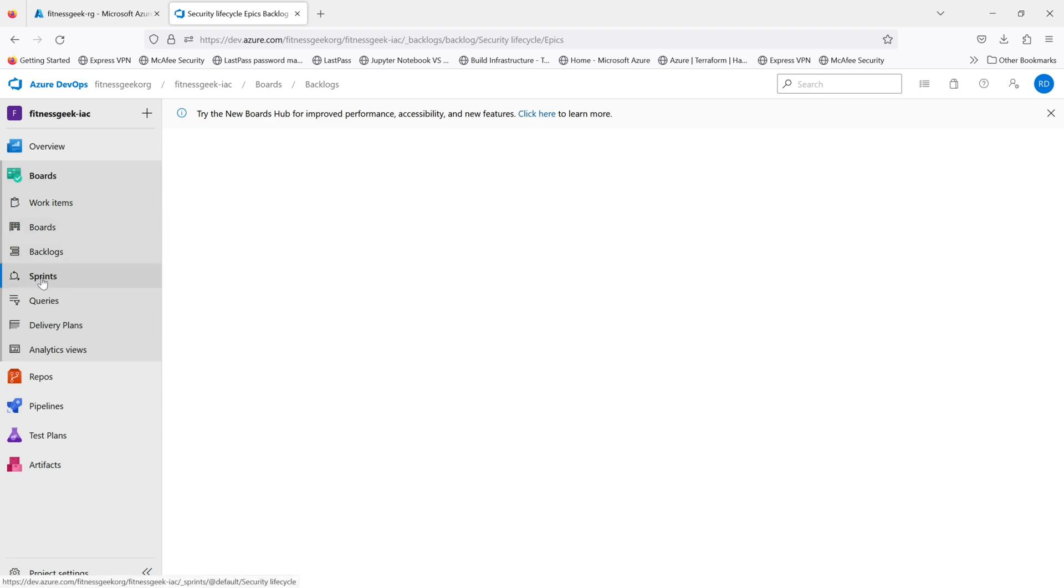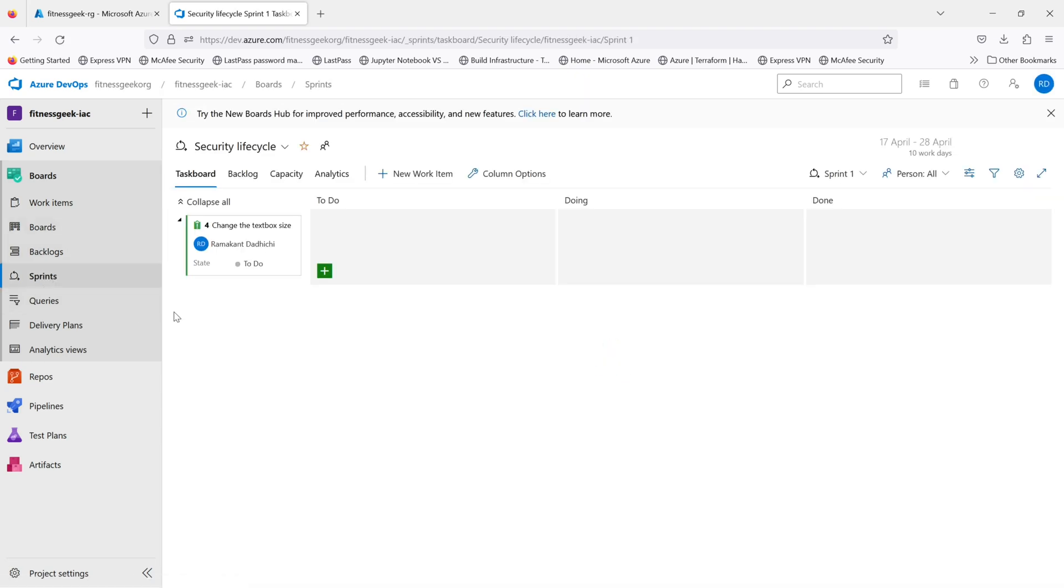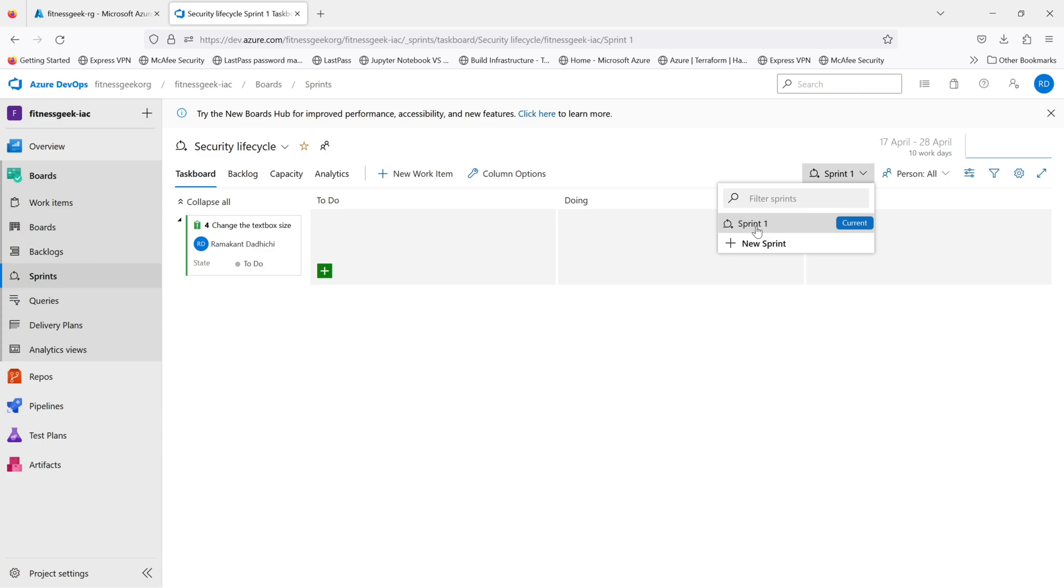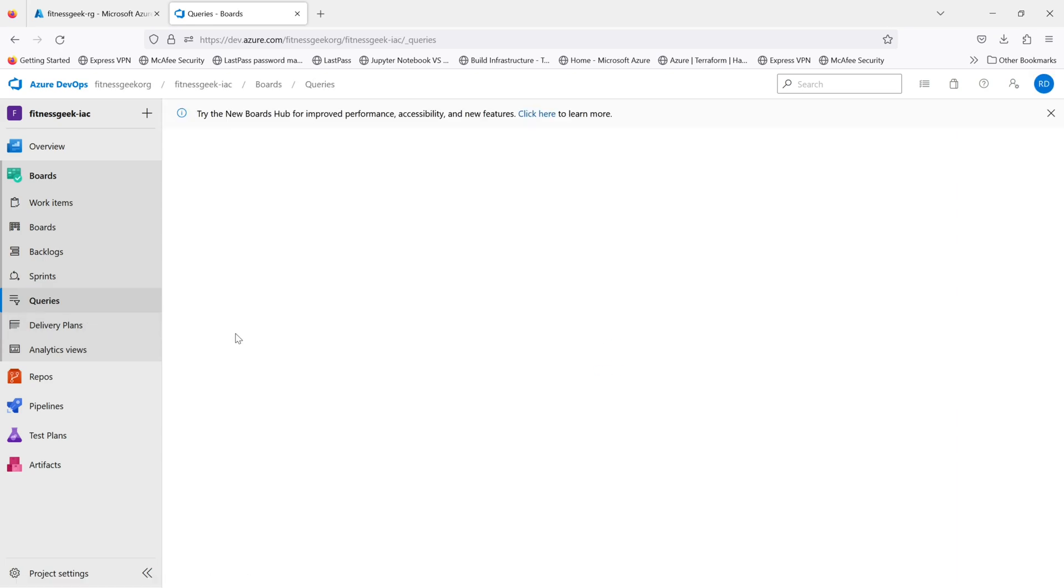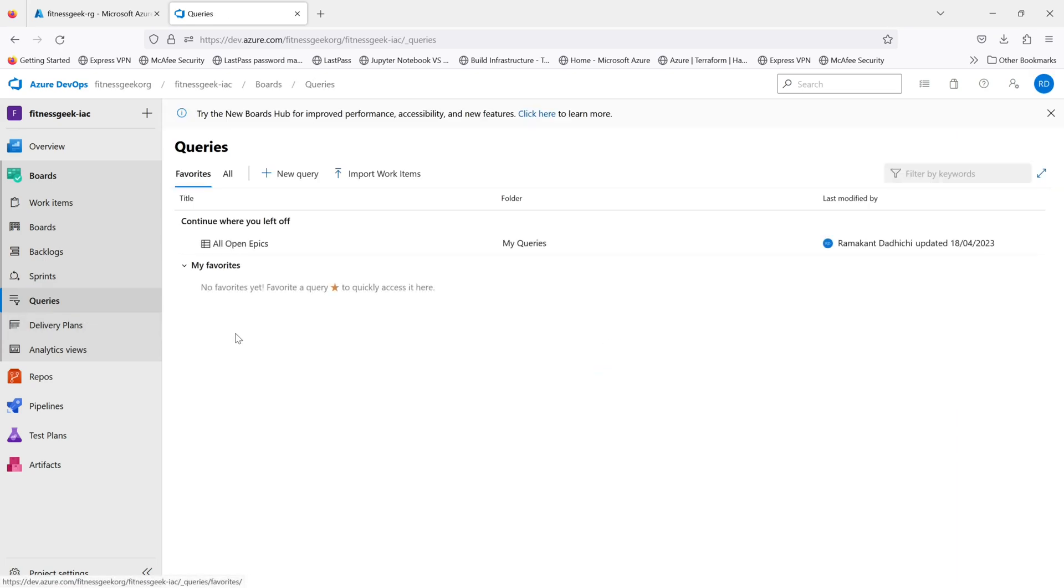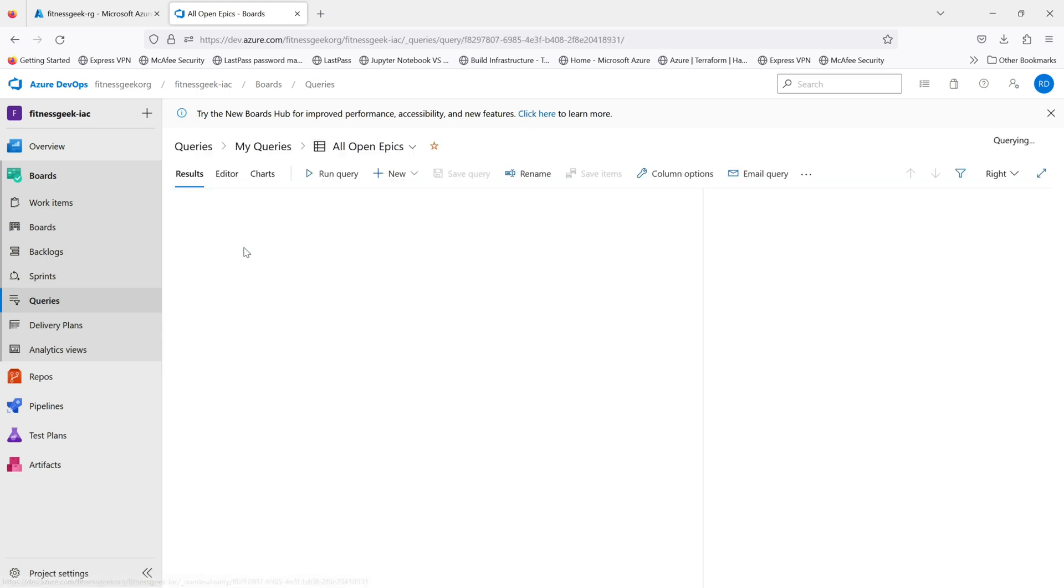This is the backlogs, and this is where you define your sprints. If you go to this dropdown, you see we are currently in sprint 1. Your project manager or your DevOps manager will be someone who will be driving your sprints.